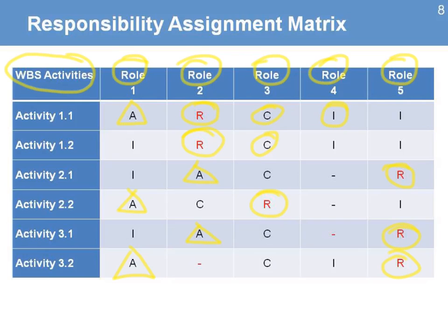Not everybody needs to be in every role. So we can see here that there are some areas where people do not necessarily need to be involved in that activity, and that is okay. You don't need to complete that for everybody, but the rule is that each activity has to have one person responsible and one person that authorizes.